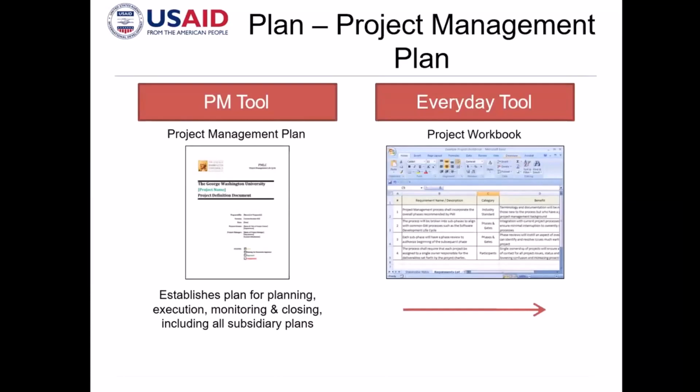All of the high-level planning, scoping, scheduling will not be high-level anymore. Once you go to the project plan, those high-level scheduling and costing will have to be the final one. And every schedule should be detailed, right? So each and every major activity, tasks, and sub-tasks will now have to be included in your project schedule. So that's the major difference of a project charter to your project plan.